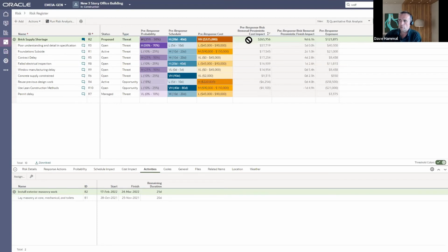So first of all, just before I switch views again, you will see those numbers from the tornado chart are also back here in your risk register, right? So absolutely the visual tools I think are helpful, but you can also have those numbers, having run the analysis, to help with your prioritization. These are all sorted in terms of that cost contribution.